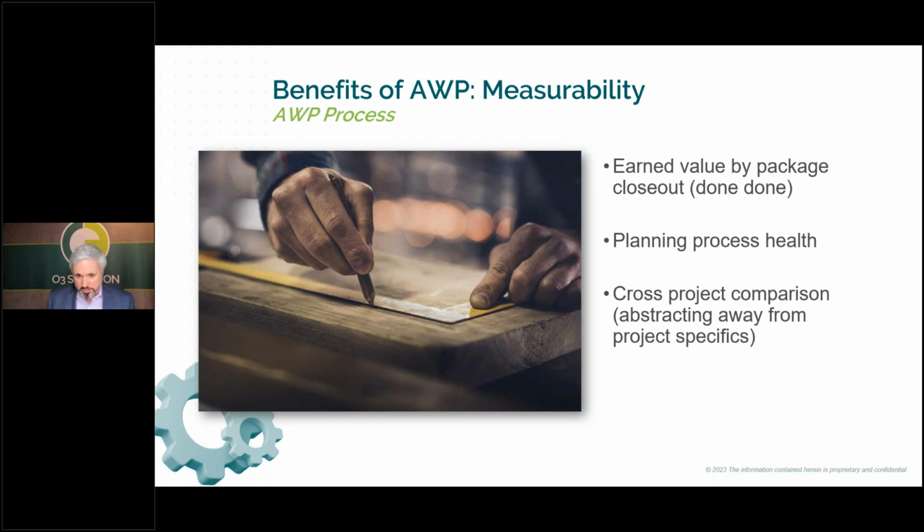It incents contractors to hang a bunch of show pipe and skip the little things, and be forced to come back and clean that up and do extra work later, right? Because you're getting paid just on pure quantities. You're not getting paid to get something actually done.